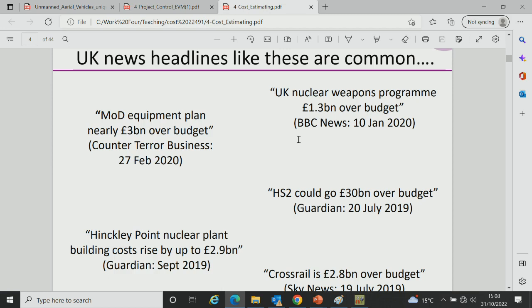Then I was looking at life cycle cost, and full life cycle cost is the cost of design, manufacture, in service and disposal. Fundamentally, the U.S. Department of Defense used to say, look, we need to be thinking about full life cycle cost, because 80% of a total system cost is in the use stage. So we're busy acquiring defense equipment, and it's costing us more in using it than actually acquiring it. So we need to be involved in the full life cycle management, cost management of these things.